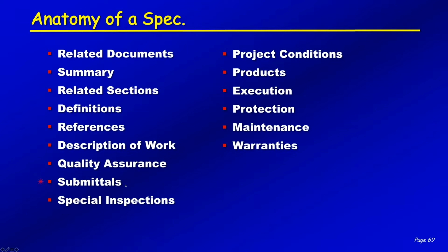The type of submittals, and I don't know if inspectors look at submittals or not. Special inspections, this typically means that, when you're looking at getting ready to bid a project, they'll tell you you're responsible for actually going out to the job site and looking at where that job is. So you can't come back and say, well, I never saw the job. Well, it doesn't work like that.